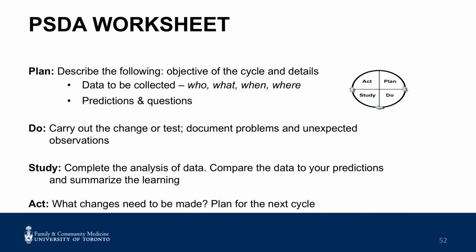If you're quite pleased with the outcome, spread the test to other parts of your practice and repeat the test there. If the test was a bust, drop this idea and move on to your next test of change. If this happens, and it does, don't be discouraged. It is precisely for this reason that the test was of a small change, rapidly implemented. No harm done.